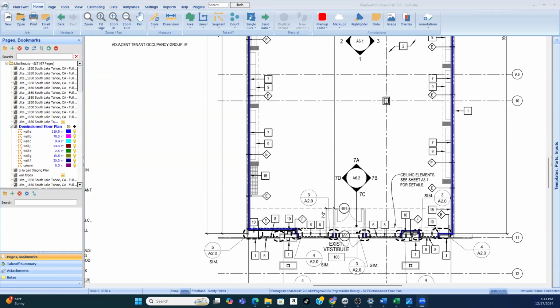Okay, so when the electrician, his civil portion will always be in his plans. So for the electrician, you won't ever have to look at the electrical set and the civil set. The electrical set always has his civil set, the outside stuff included in his set, but not so much for HVAC or plumbing.